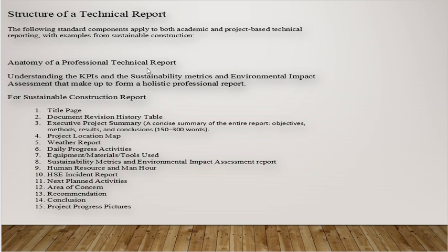The fourth one is the contract document. For every construction project, there is a contract document binding the contractor, the consultant, and the client. If you have access to the contract document, it carries the scope of the project, it carries the bill of engineering measurement, which is the BOQ, and it carries the scope of work. Everything you need to know for the project is contained in the contract document.